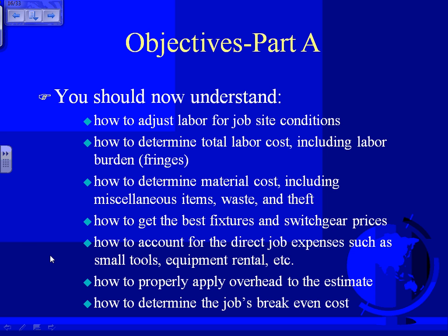So the company would say, if you screw up and you don't perform, we can cover up to, based on the state, $25,000. And that's like an annual thing. Yeah. And then most jobs of any consequence will require a bid bond and a performance bond. Certain jobs require you to provide a 10% bond or so, so they can get the riffraff out of the picture.